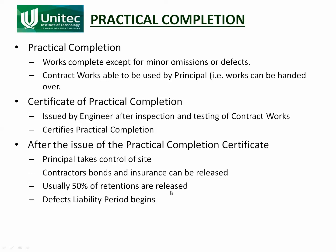Usually 50% of the retentions are released. Retentions are a certain amount of money that the principal holds back to make sure that the contractor completes the work. So 50% of those retentions are given to the contractor at practical completion.